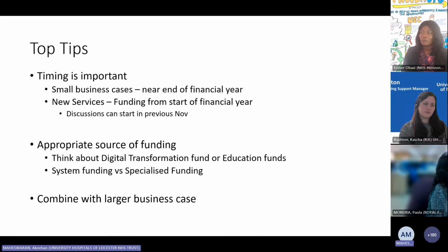So you've got to think about recruitment timelines. Royal College approval for jobs can take a while for consultant jobs. So things can take a while to progress and get people into post. You may say, I want locum funding to start with, but you need to make sure you factor all that in. So appropriate timelines, try and plan for funding for the start of the financial year for new services.